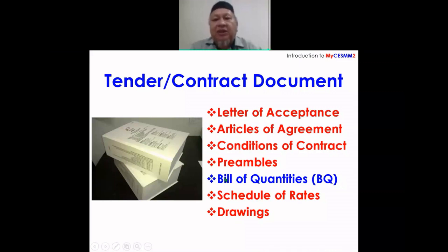So BQ, for those who have seen a BQ, basically is a list of items so that the contractor or the tenderer can price it. So come up with rate times the quantity, therefore there will be an amount. Add all the amounts, therefore it becomes a total sum. And this total sum is named as a tender sum. If that tender sum is accepted, then it becomes a contract sum. That will be the basis of a contract to a contractor by the client and monitored by the respective consultant. So this contract is mainly dealing with BQ,